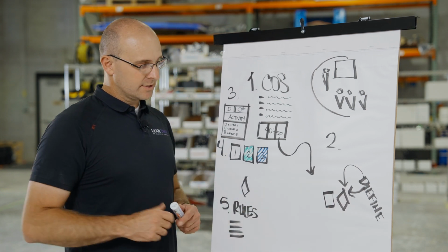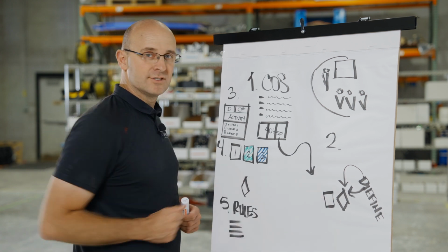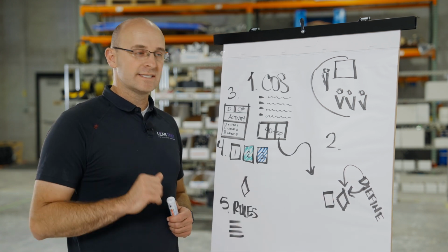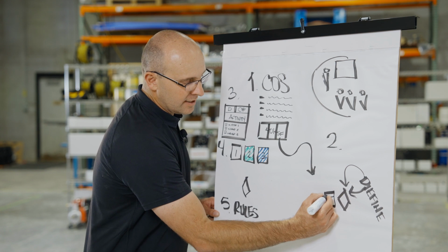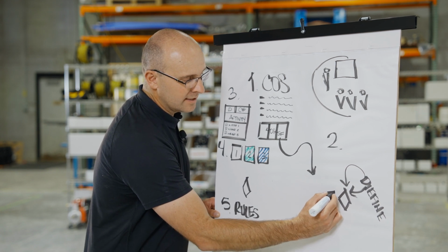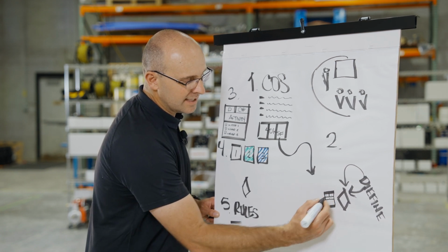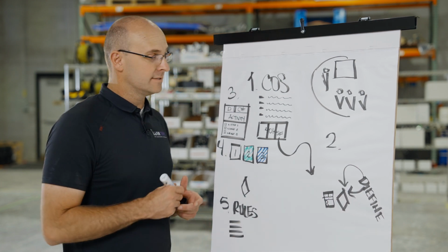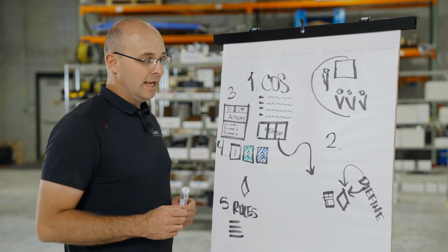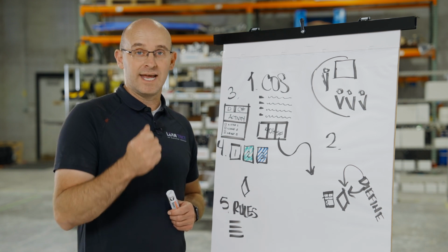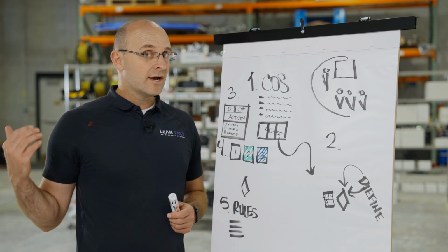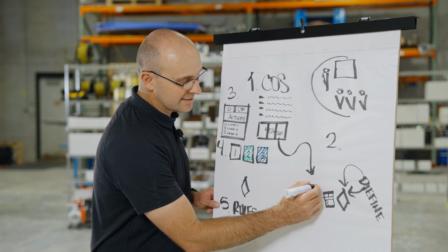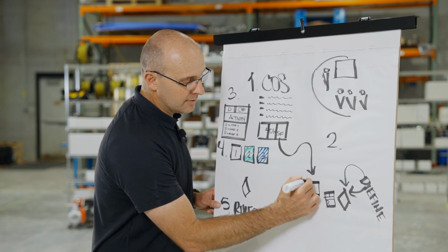And this is what you do. You ask that person to come up and put their sticky in just before the milestone. They describe, hey, this is how long it takes, this is the crew size, this is the activity, but most importantly, they will have needs, just like I showed you up here. What they will ask for is, they will say, hey, I need this. Then another trade partner who has that sticky will go ahead and put that up here.